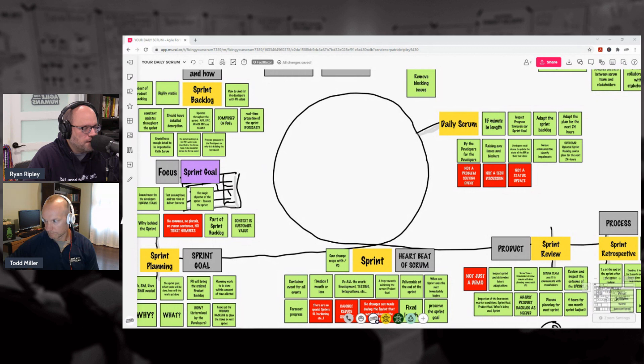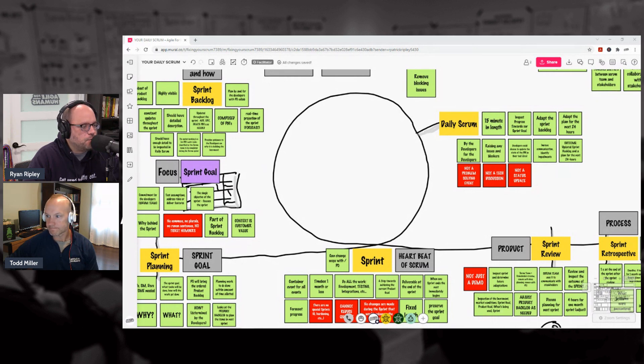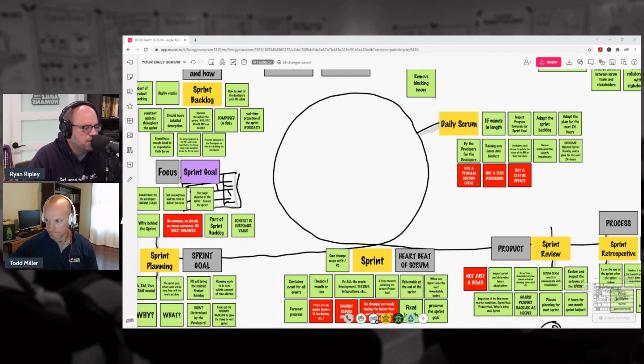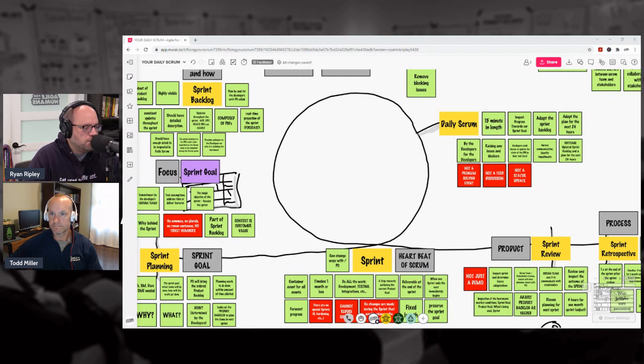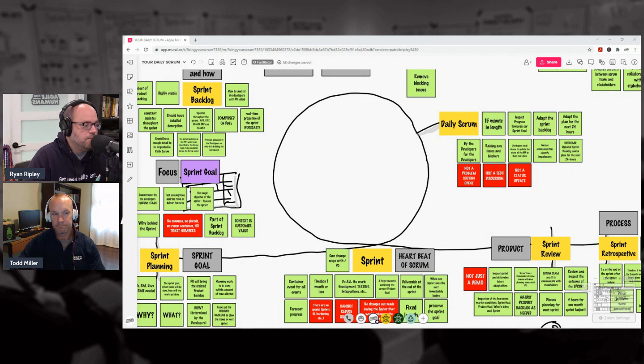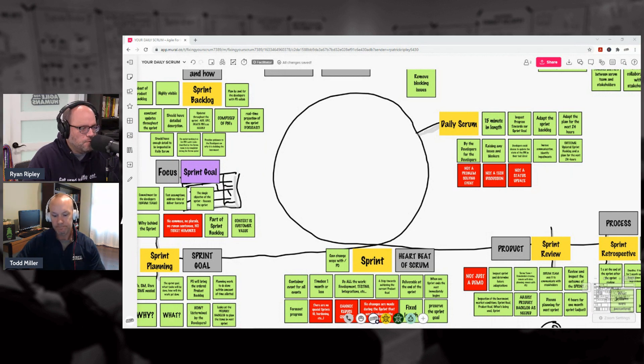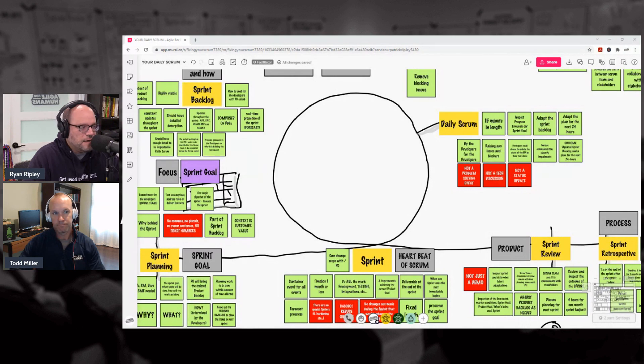Then at the towards the end of a sprint we're gonna have a Sprint Review, totally focused on product. It's not just a demo. It's getting together with stakeholders and people interested in the outcome of our work—customers, users, people buying and paying for the work. We get together, we talk about market conditions, budget, how the product's being used, what the feedback is about the product.